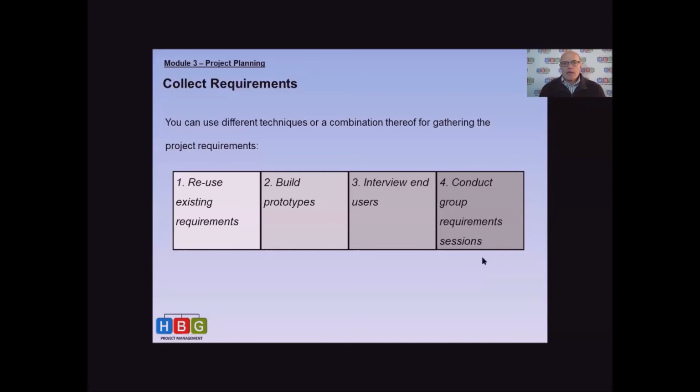And then conduct group requirement sessions. So yes, that's where you sit with your stakeholders and your client, and you go through these sessions and you talk to them and you ask them what the requirements are from their side, so that you know exactly what you need to do in the project and how you need to build the foundation of the project, so that it's firm, and that there's no gaps when you start actually putting the project plan together.